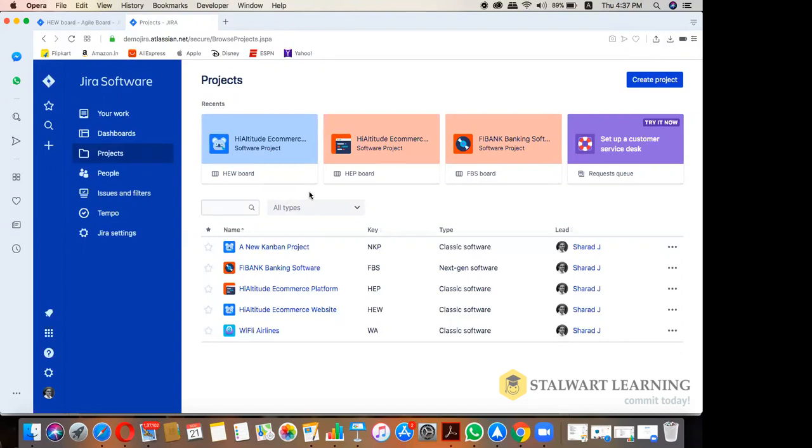Why I say a workflow is, the longer it stays in that status, you can always tell from the sprint report, you can tell from the reports that it stayed in there for that long time. It's possible. What we call cycle time. Because ultimately you don't want it to stay there. You want it to be worked on. So highlight it. That is what I would recommend. So use your workflow very effectively.